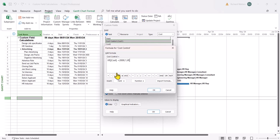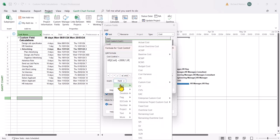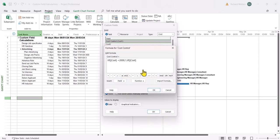So I'm going to write double IF and every IF comes with an open bracket. And I do the same again, cost again. And this time is less than 4,000 but greater than 2,000. Then I want that to be another comma then, that comma means then. I want to tag it with a number 2.